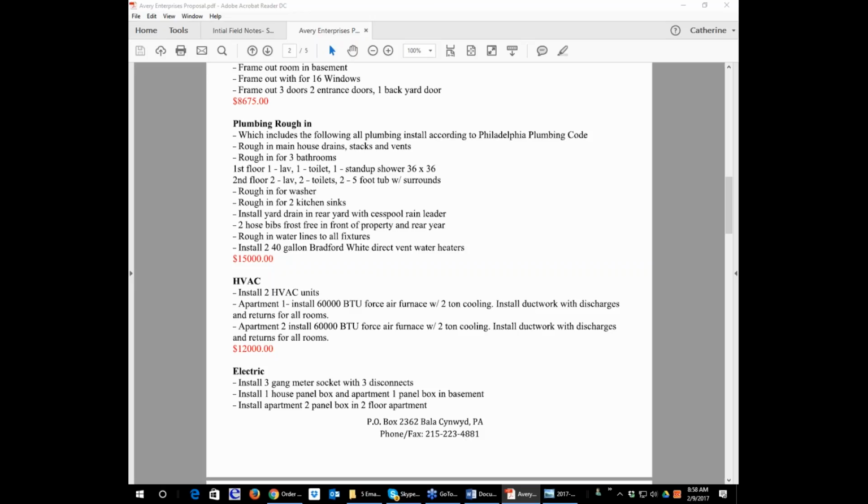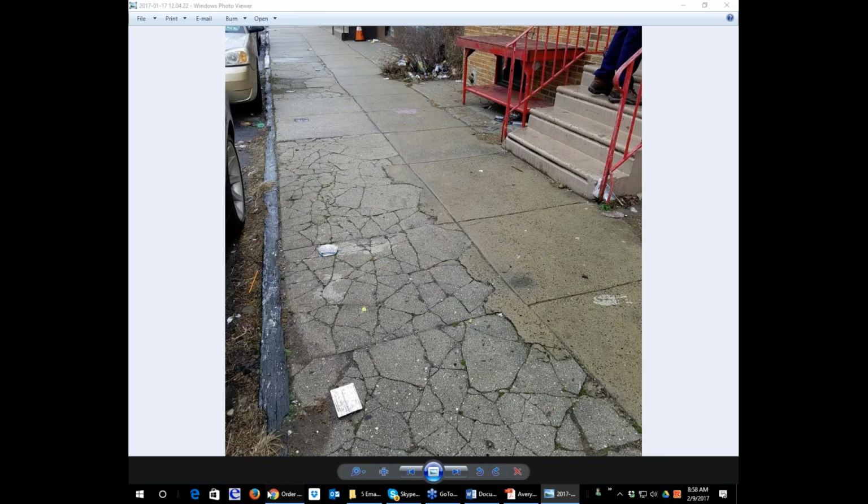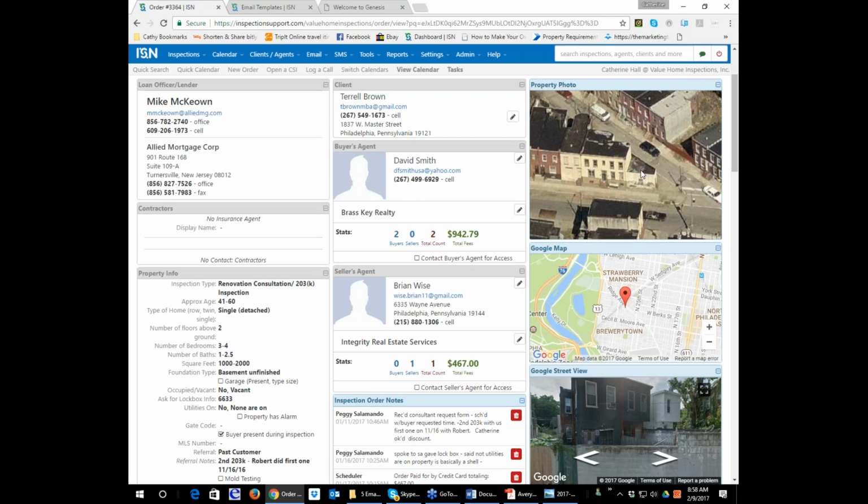So yeah, they can go with a 35,000 BTU furnace, but I don't even want a furnace because, as you saw in the pictures, in this little corner lot, where am I going to stick a furnace for this piece here? I don't have any space for a furnace, and I don't want to have to deal with that.